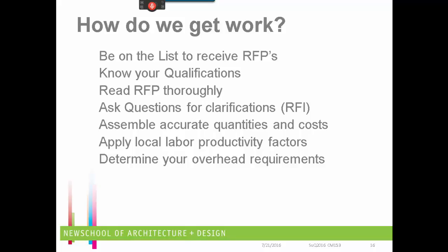But when you look at the major commercial projects that are being done, you'll find that most often what's out there is a profit margin of about 3%. So 3% on a $1 million project is only 30 grand. That's not a great incentive. But 3% on a $100 million project is $3 million. That can be quite an incentive for a firm.